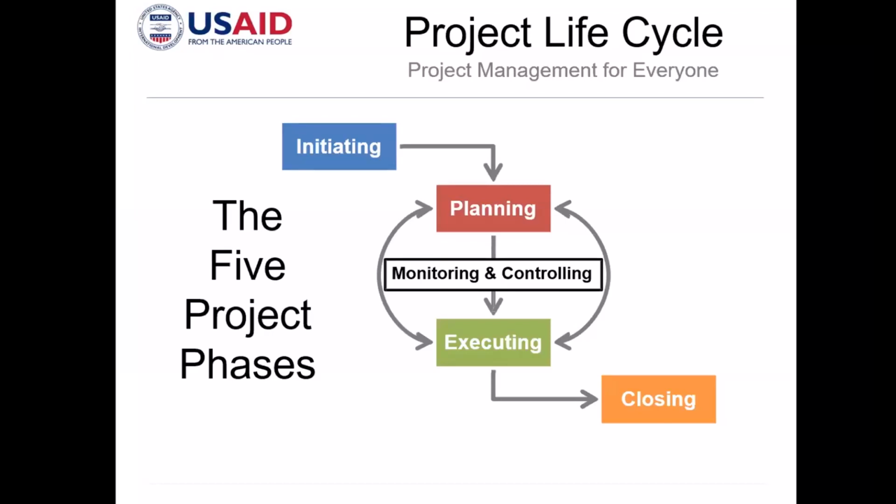Once the full project has been completed, maybe up to the last bolt that has to be installed, you have to gather again all the stakeholders and agree to close the project. So that's the complete life cycle of the project: initiation, planning, execution, and then closing. And in between, you have to control it and monitor it for, of course, any issues along the way.